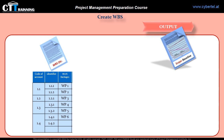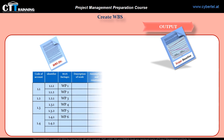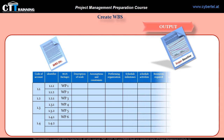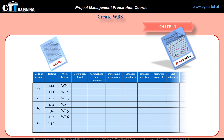How does the WBS Dictionary look? It could include the following information: Code of Account Identifier, Description of Work, Assumptions and Constraints, Performing Organization, Schedule Milestones, Associated Schedule Activities, Resources Required, Cost Estimates, Quality Requirements, Acceptance Criteria, Technical References, and Agreement Information. In fact, you can add more columns as more information is needed.